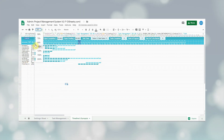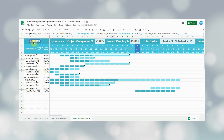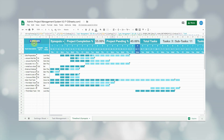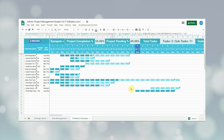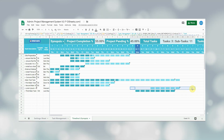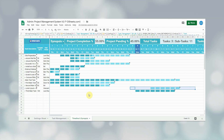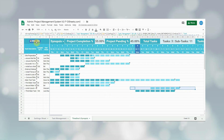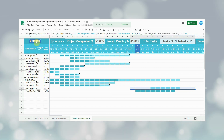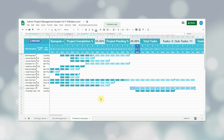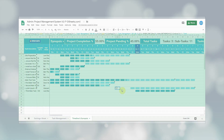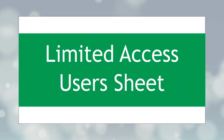The last thing to explain in this section is the update dates button. In the task management section, I showed how to set starting and ending dates via the form. There is another easy way — in the project timeline section, the user goes to the row of the task whose dates they want to update, selects the cells corresponding to the required date range directly in the timeline, and then clicks the update dates button. This will update the dates in the task management section and highlight the relevant cells in the timeline.